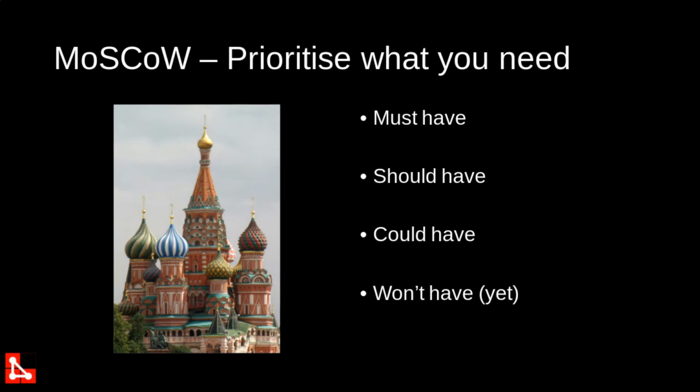So what you try to do with these requirements, well, first of all, we're actually not yet in the planning of building, but what you try to do with setting up this classification of requirements is you know you can make some trade-offs, right? So you know that the must-haves, you can't make a trade-off. You can't say, oh, I'm going to do this one, but not that one. You got to do all of them, right? That's part of the minimum viable product. But with the should-haves and the could-haves, etc., you can make some trade-offs.